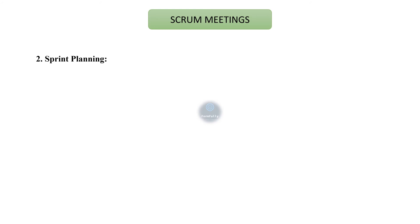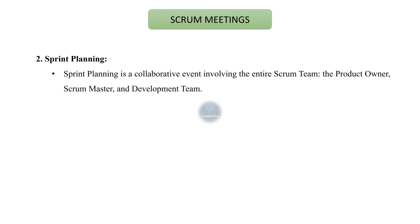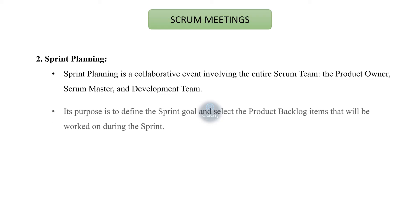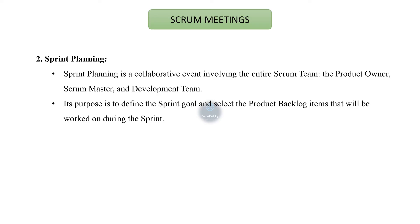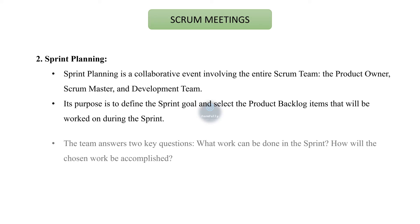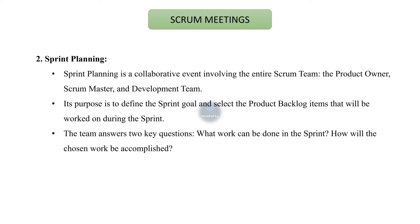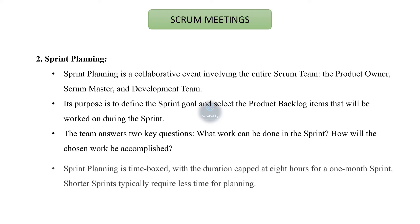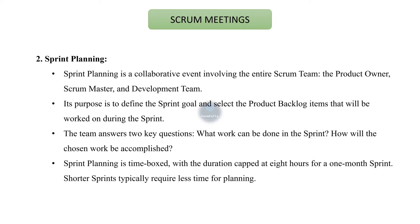The second Scrum meeting is sprint planning, a collaborative event involving the entire Scrum team — the product owner, Scrum master, and development team. Its purpose is to define the sprint goal and select the product backlog items that will be worked on during the sprint. The team answers two key questions: what work can be done in the sprint, and how will the chosen work be accomplished? Sprint planning is time-boxed, with duration capped at eight hours for a one-month sprint; shorter sprints typically require less time for planning.